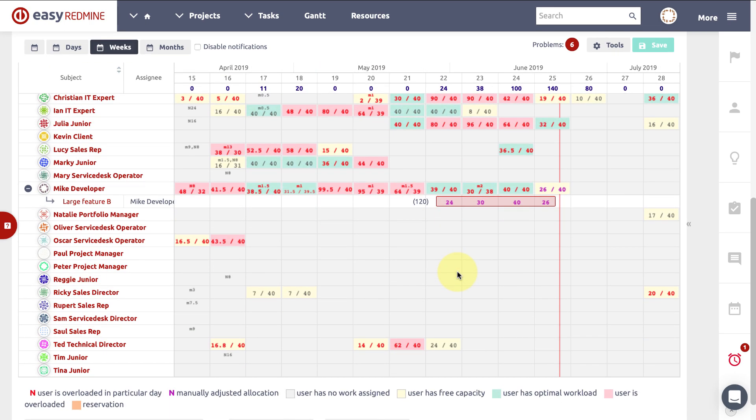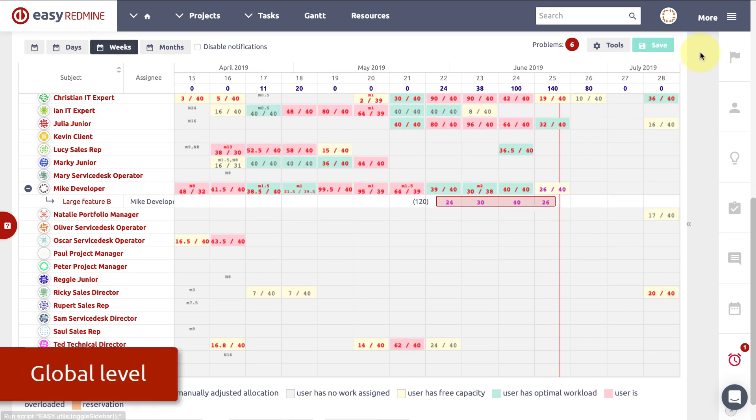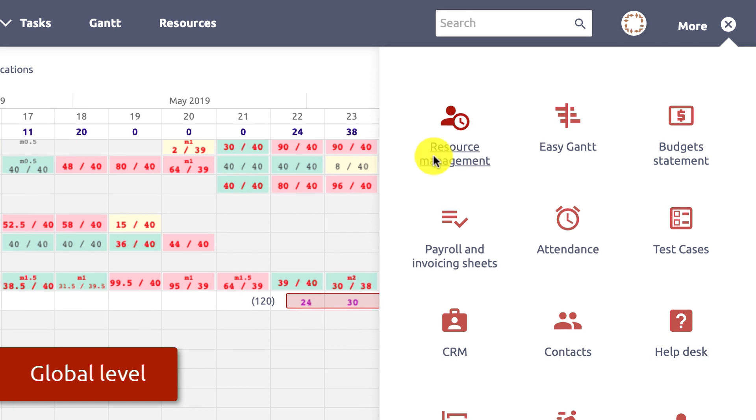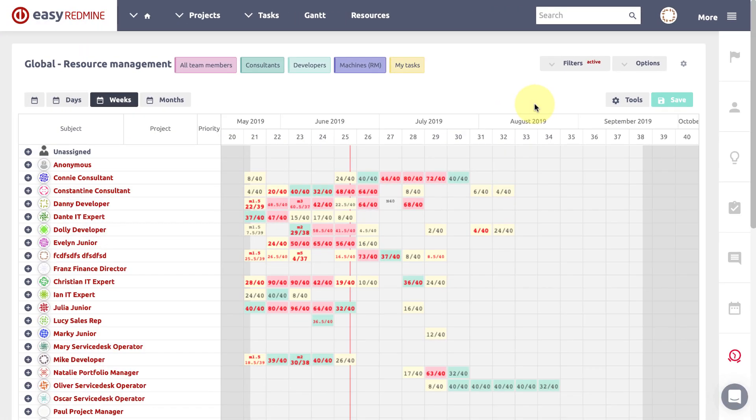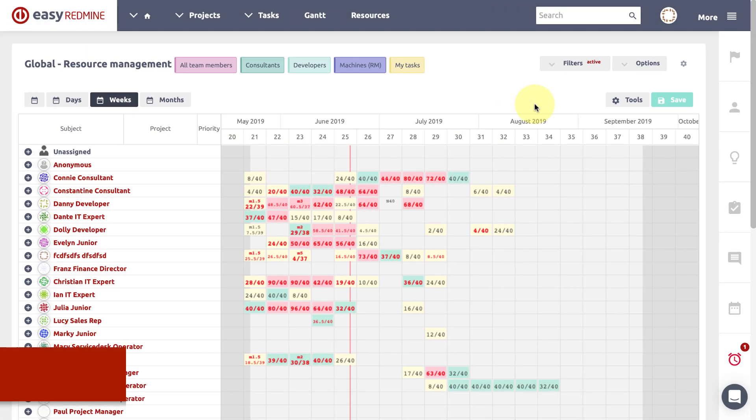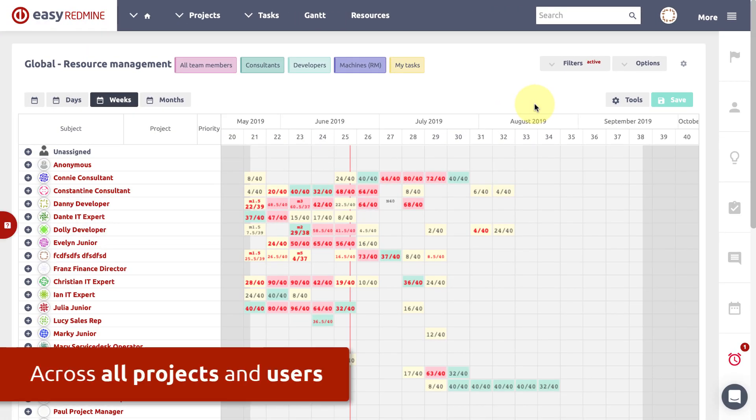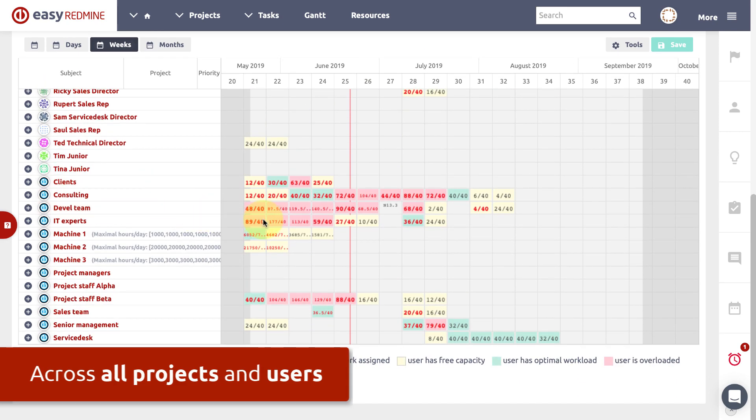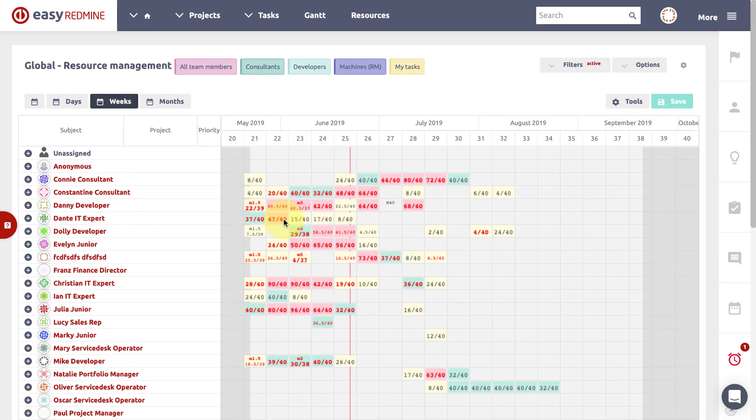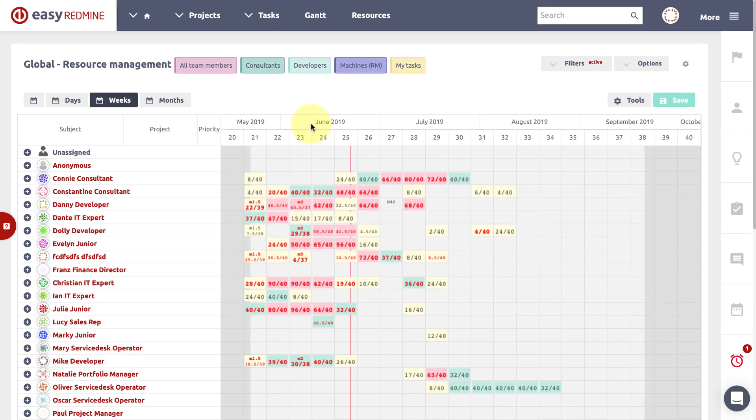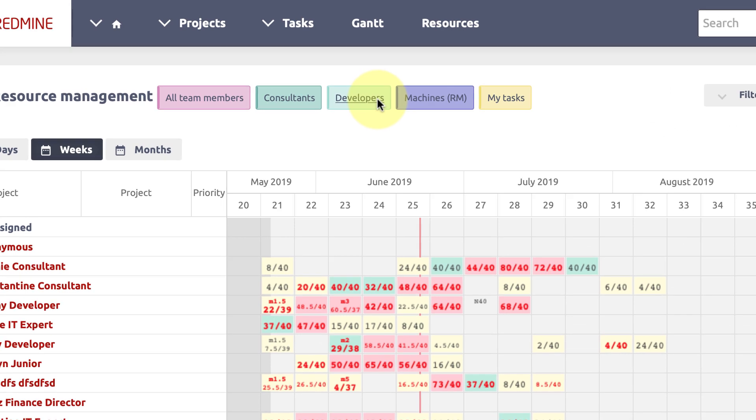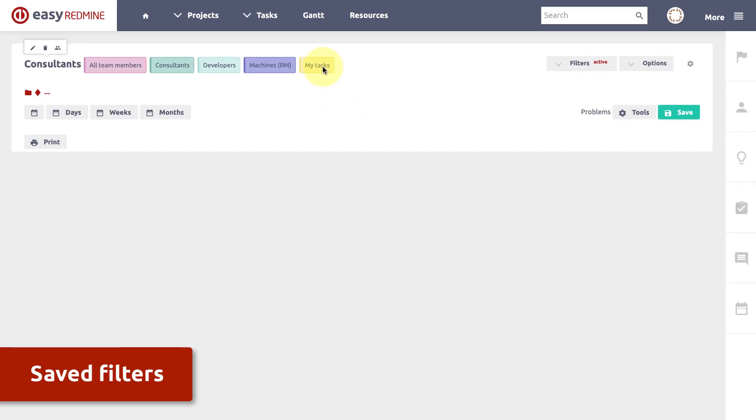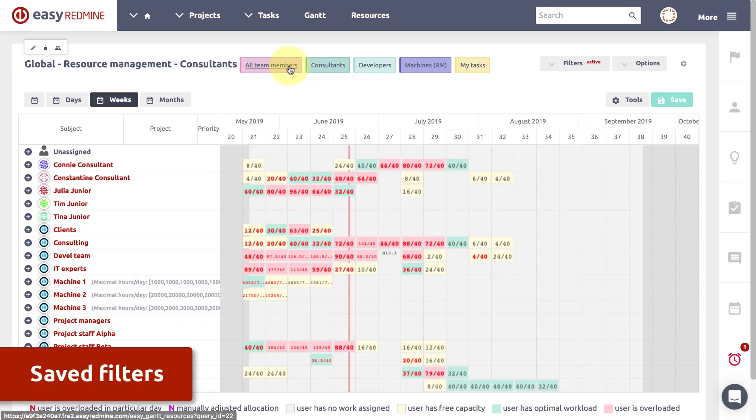Global resources management or resource master plan can be found in the main menu. It is the number one tool for resource management across all projects and users. Here you can see the users and utilization of their time in the future and you can have saved filters above this view to filter users or tasks.